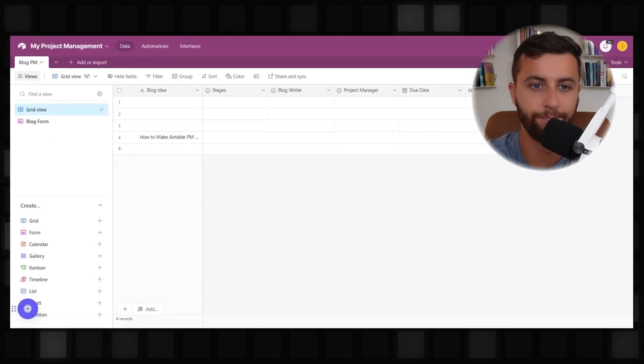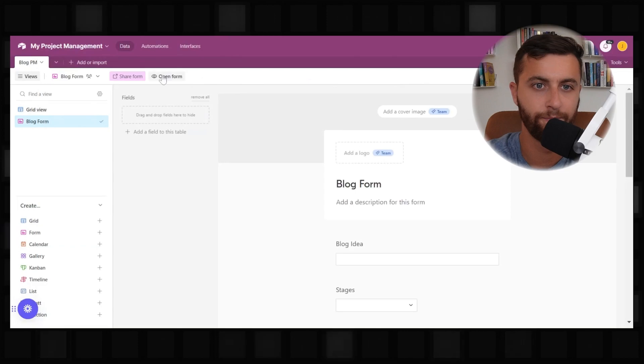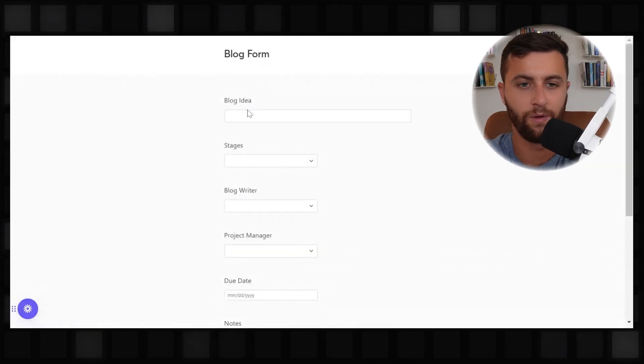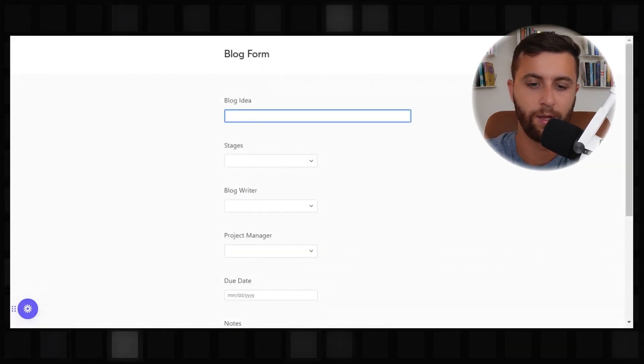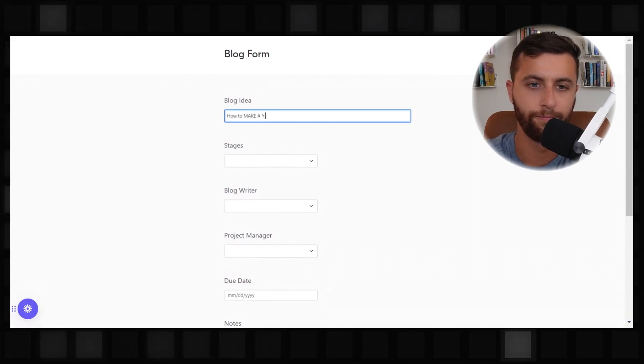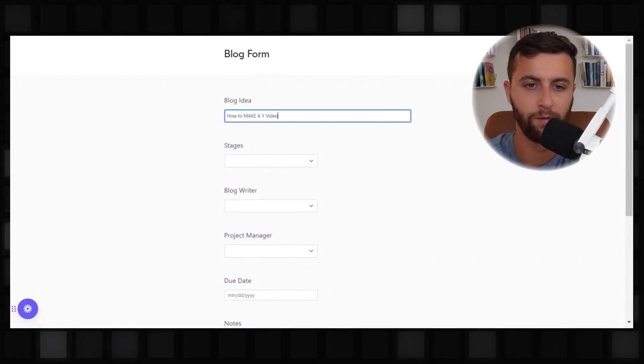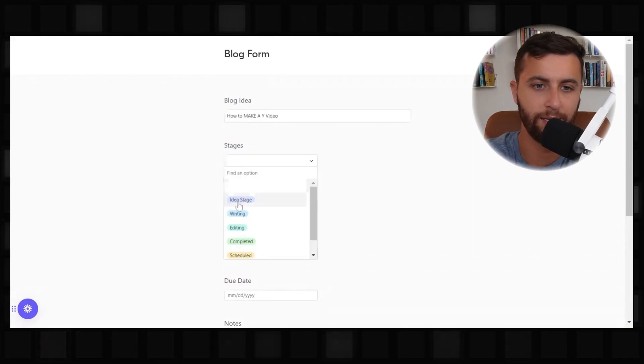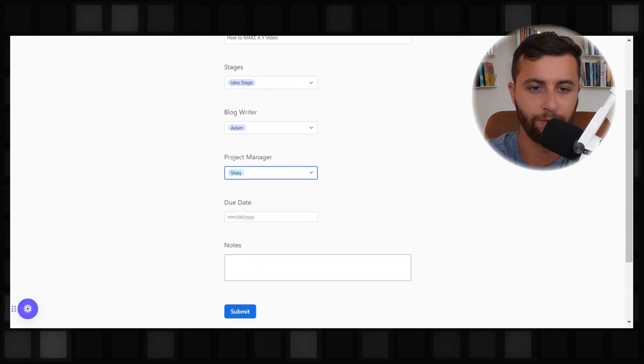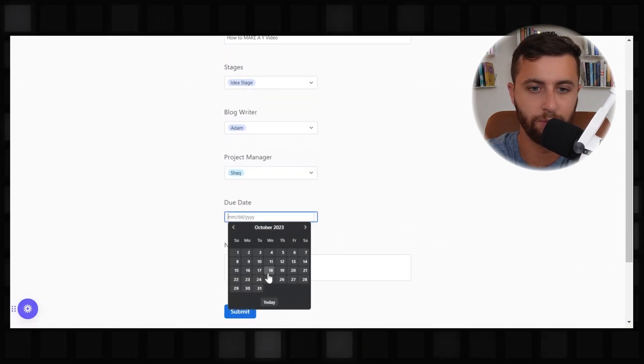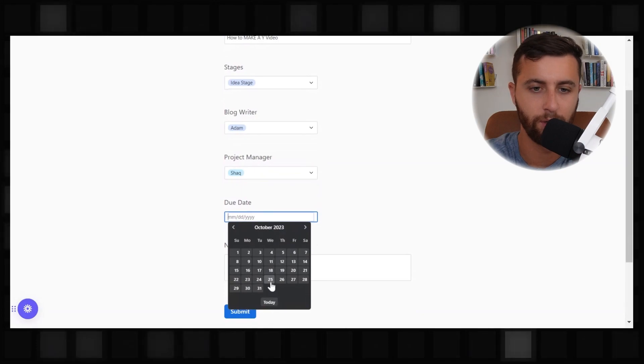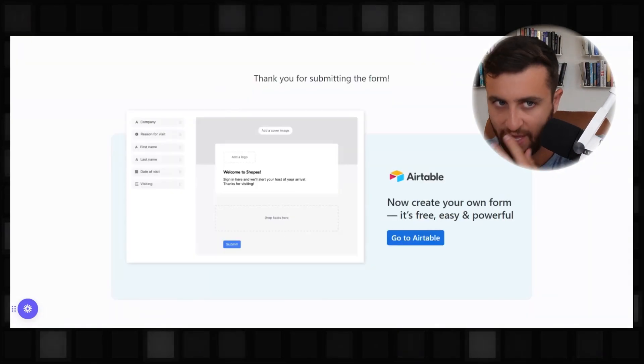So forms are great because in project management, you want to be able to have a way where team members while they're on the go and they're away from their laptops and their computers, they can actually add things into project management and they could actually tag different people. So going back to that form, let's do how to make a YouTube video. It's in the idea stage. The blog is Adam and we're going to have Shaq manage it. And this is going to be due at the end of October. So what this allows us to do at scale is make sure we start to, when we come up with ideas for blogs, they are in here.